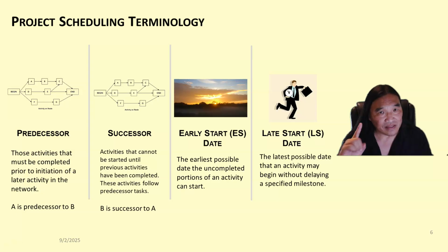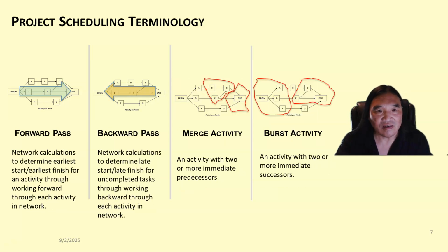Now a lot of people get this wrong. A lot of professionals say, you're on the critical path, and they think that it means that you're on the riskiest path or the most difficult path. No, in project management, the critical path is just what takes the longest.